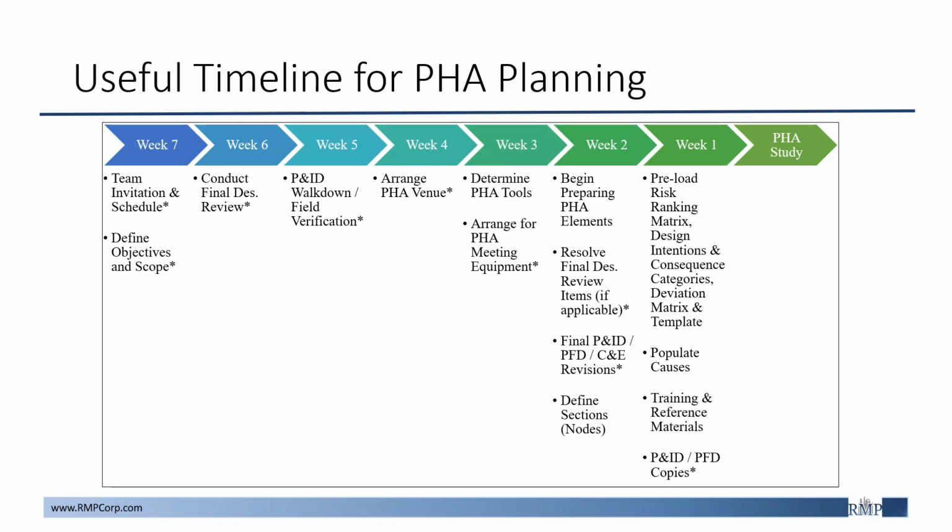A few weeks before the study date, it is important to determine what PHA tools will be used and what meeting equipment will be necessary so that all members can properly prepare for the choice of methodology, and so that the study can be performed with equipment that will improve the quality of the session and limit the disruptions that may come up during the session due to any technological or connection issues.